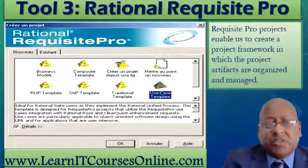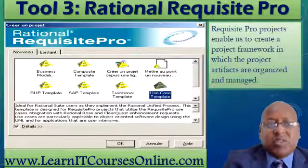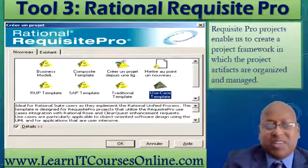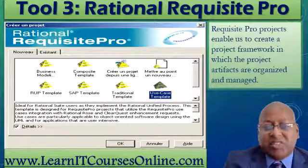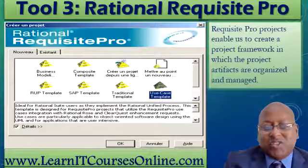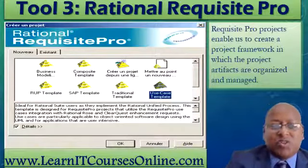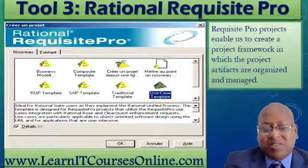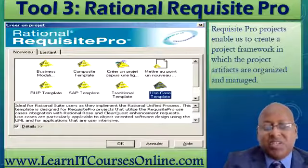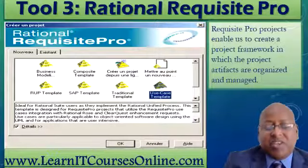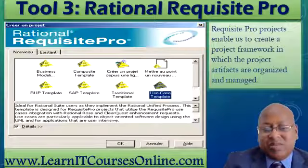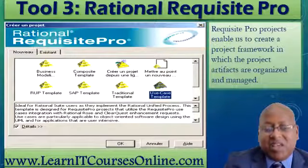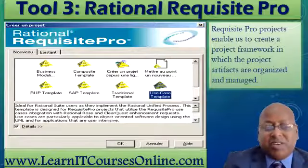Another software commonly used is Rational Requisite Pro. It supports the process of eliciting, documenting, organizing, tracking, and communicating requirements across project teams to ensure that iterative and unanticipated changes are maintained through the project lifecycle — including monitoring status and controlling changes to the requirement baseline. The primary elements are change control and traceability. Requisite Pro is used for querying and searching, and viewing discussions that were part of the requirements. In Requisite Pro, the user can work on a requirement document, which is usually a Microsoft Word file created in the RecPro application integrated with the project database. Requirements created outside Requisite Pro can be imported or copied into the document.